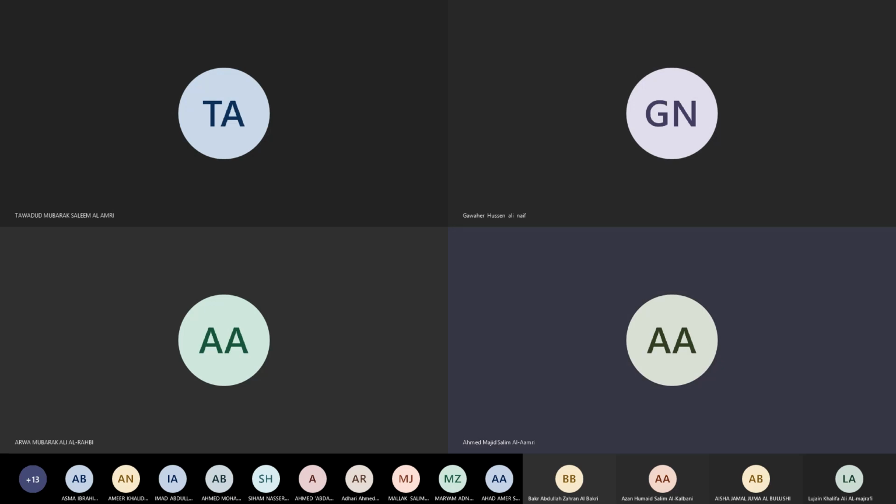So if we go and see in the contract formation, the first thing that we need to have in the contract is to have the statement of work that we have talked about earlier. After having the statement of work, normally we'll go and choose the suitable payment method and the suitable delivery system, which I need to keep in mind according to that particular project.